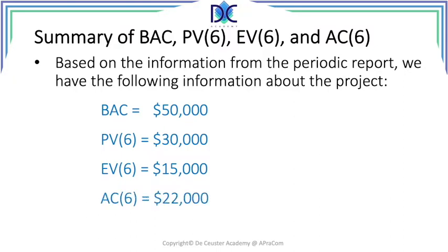Now, when you look at these values, we see the actual cost is below the planned value, so we're below the curve, which in the classical approach could lead to euphoria. We are, let's say, spending less money than we basically planned for, and it would create some positive attitude, although we will see in the following parts that it's not really the case.